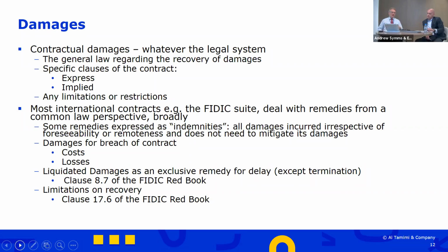And it is quite important, I think, when you're thinking about what it is that you're going to be able to claim. What you are paying out over and above what you would have been paying out, that's a cost. And a loss is where there has been a loss of an opportunity in some way, or loss of profit. Unfortunately, in English law, and indeed in the English language, the term losses is used interchangeably, when actually in law it should mean something quite distinct.